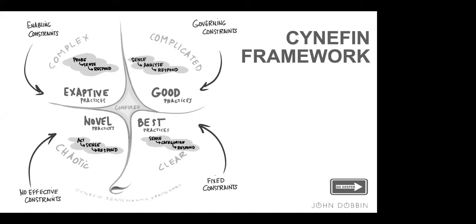So what we use this framework for is to make a decision about whether we're going to run a project using waterfall or Agile. Where it's clear, just use waterfall.